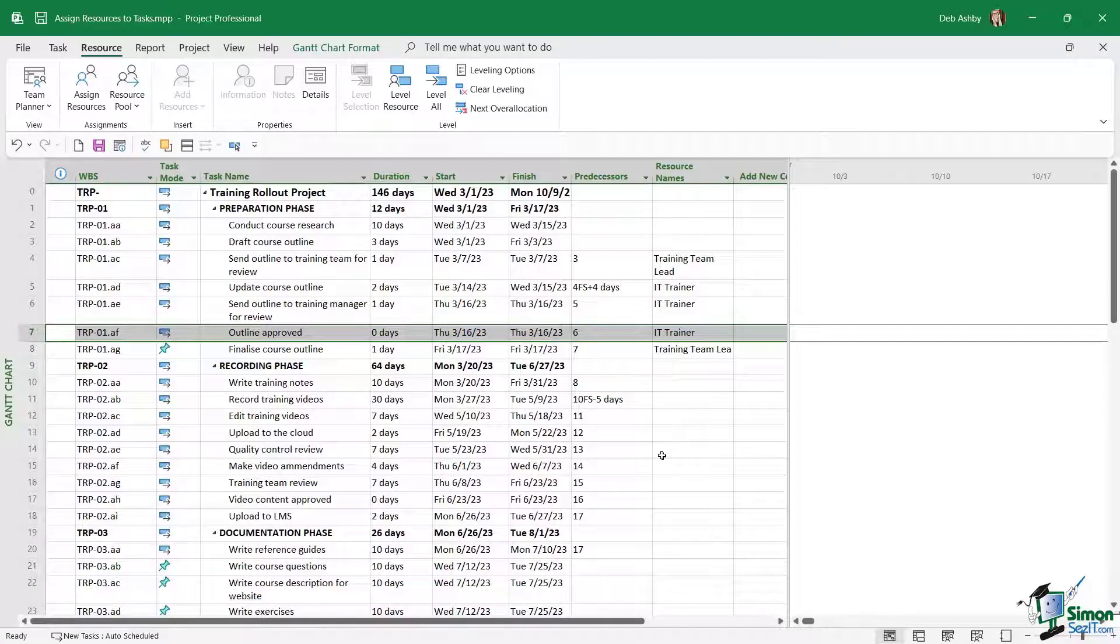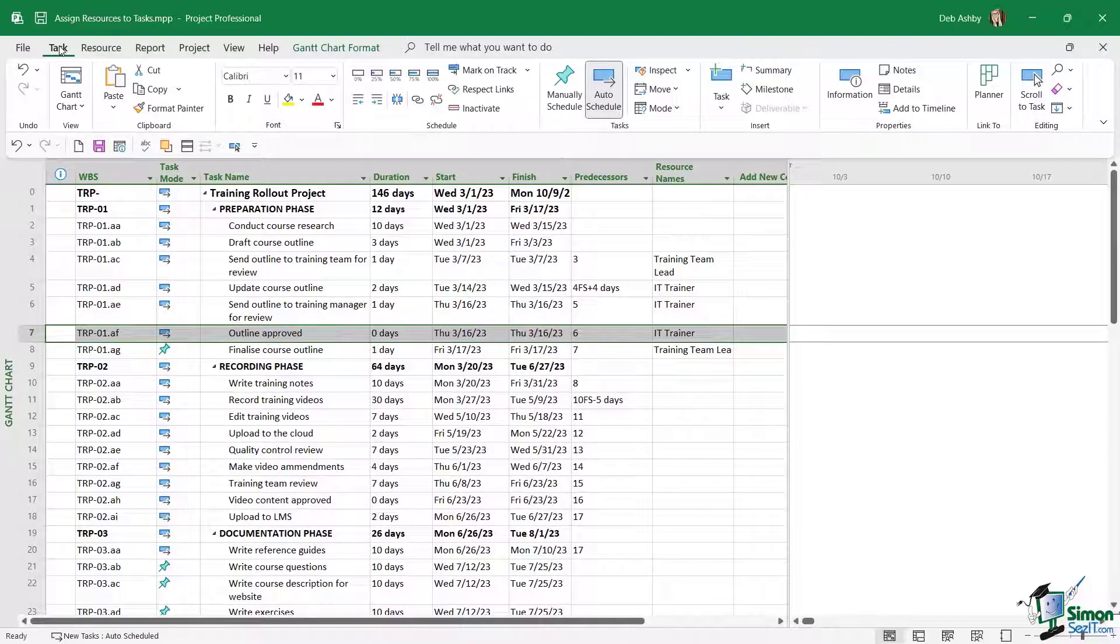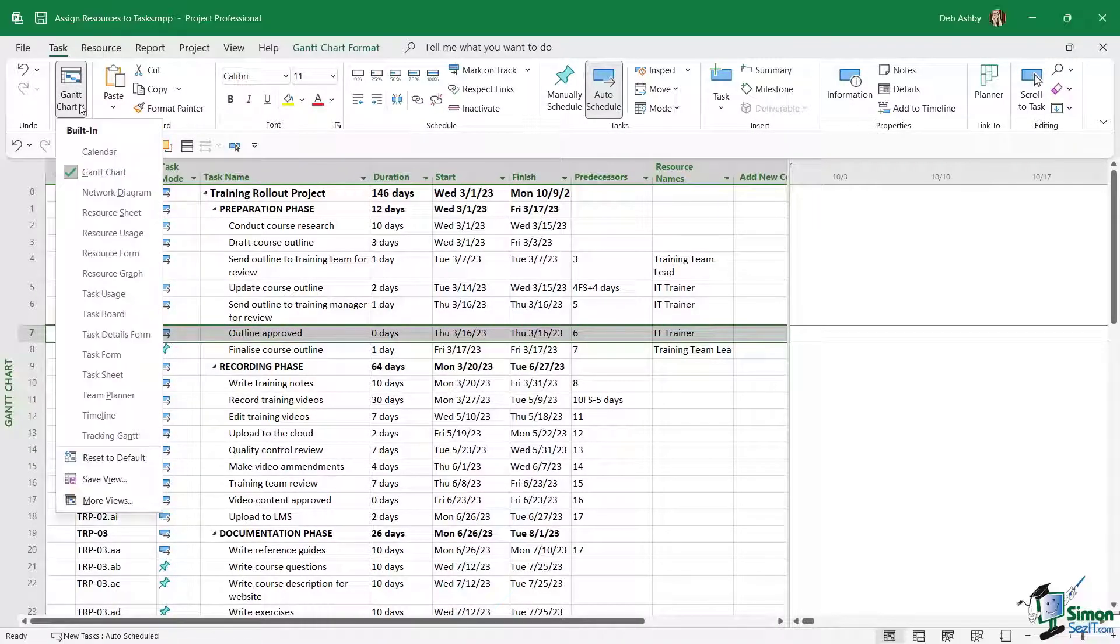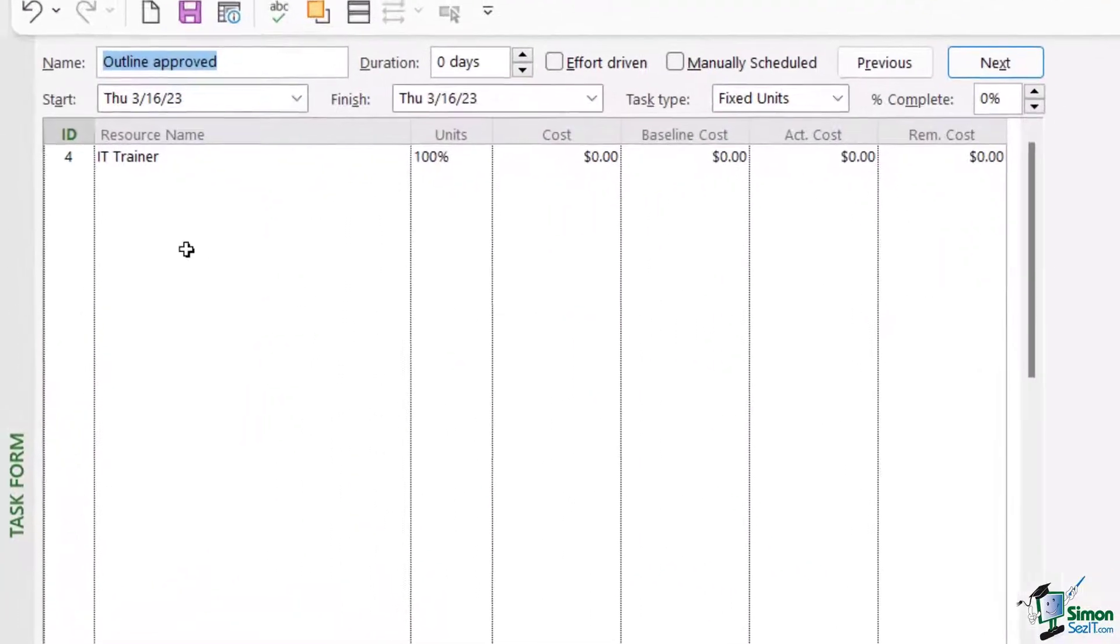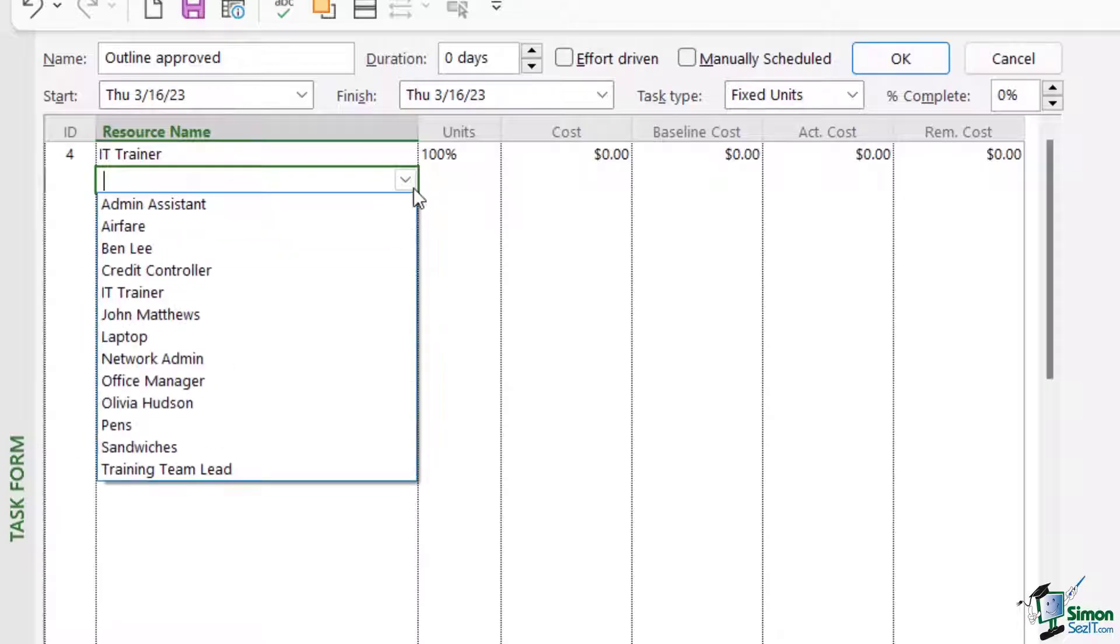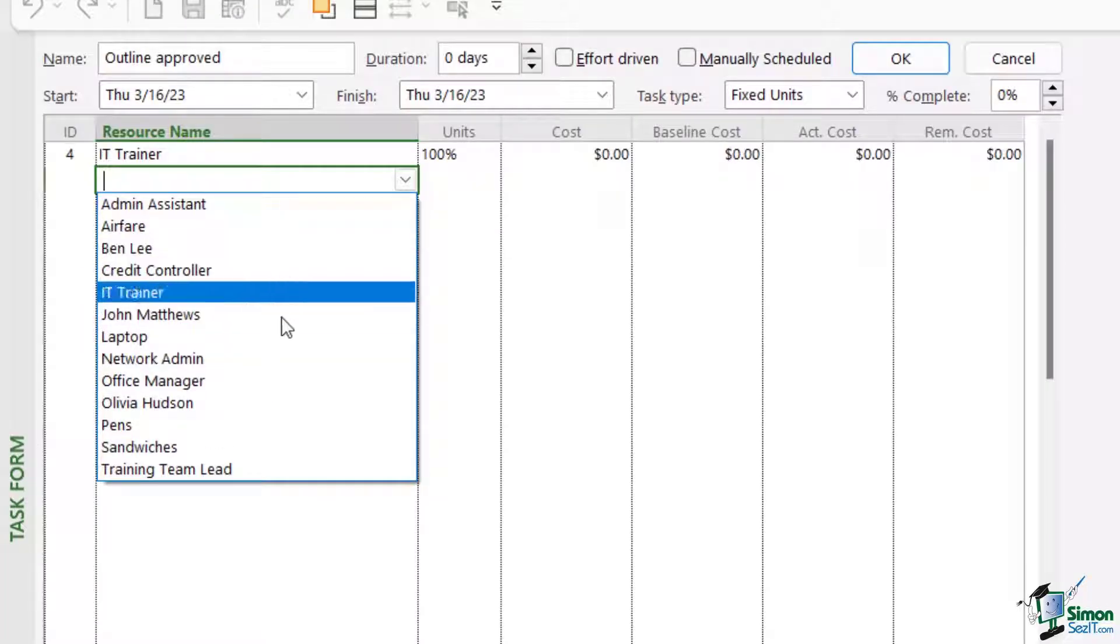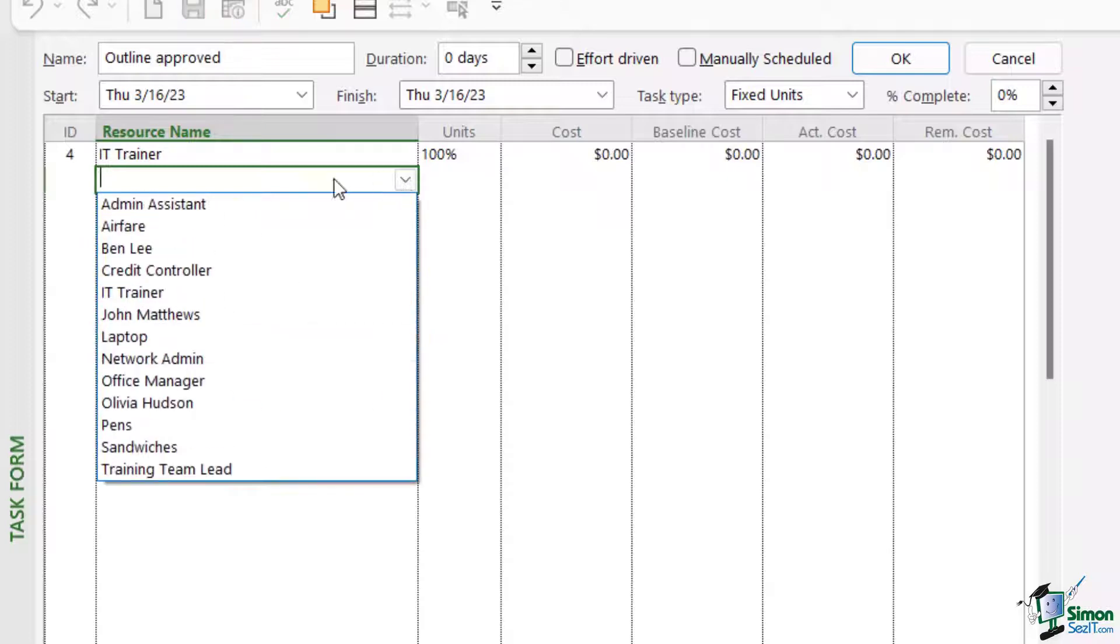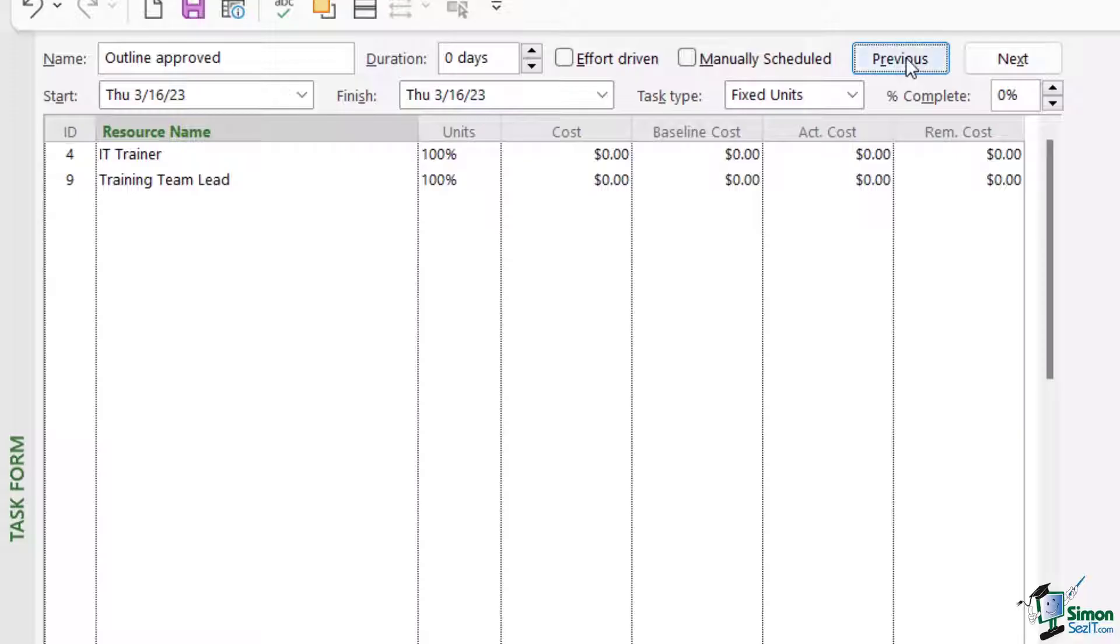Another way that we can assign resources is by using the task form. Let's go to the task tab, we're going to click the drop-down underneath Gantt chart and switch across to task form. So now we can see all of the resources. We can simply click in resource name and select a resource from the drop-down list. I'm going to add the training team lead as well.